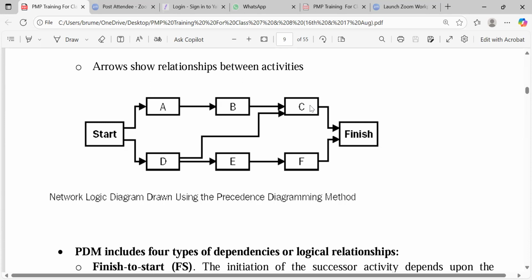Can you repeat that? I said we have 4, 4, 4, that is A, B, C, which make 12 days, right? And they are 4 days each. If you now decide to delay A by an additional 1 day, what do you think will happen to the total days? It'll be 13. It will increase to 13 days.